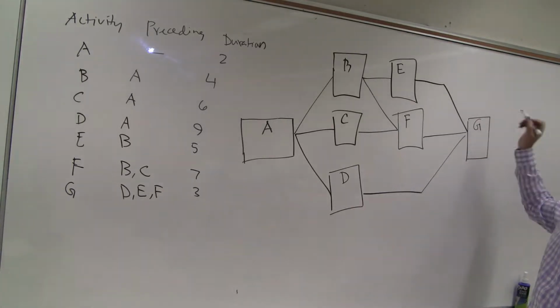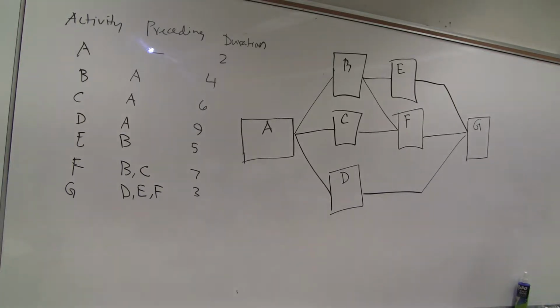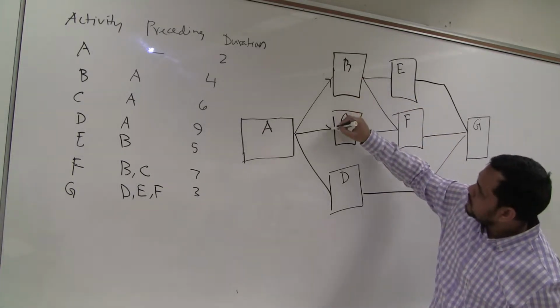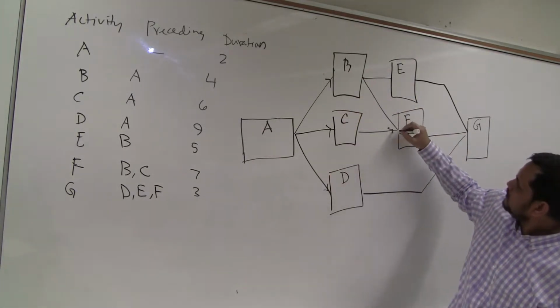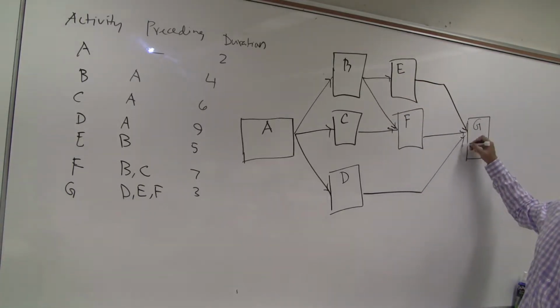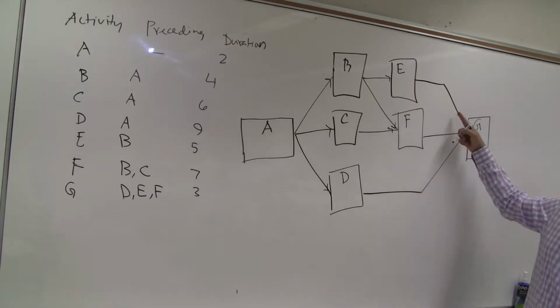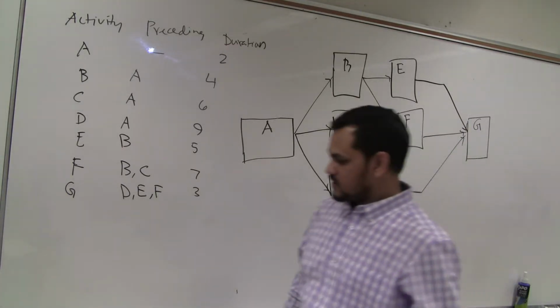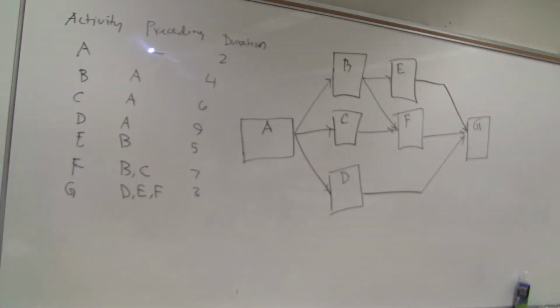G. Okay, diagram. You are forgetting the arrow. Even I am forgetting the arrow. In a node diagram, I saw that people do not write this arrow. But in an arrow diagram, there must be an arrow. Otherwise, it is a mistake.